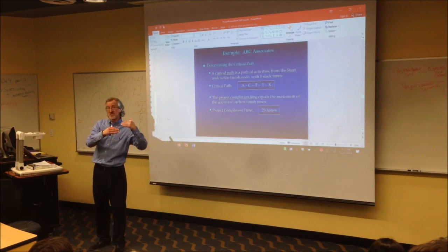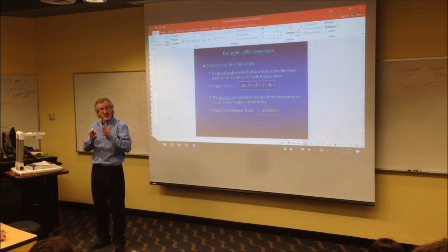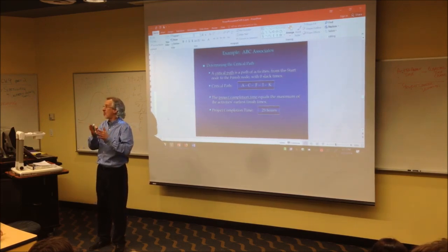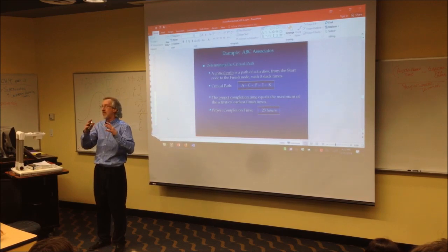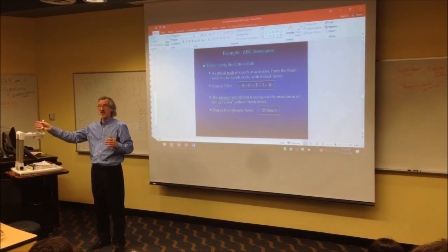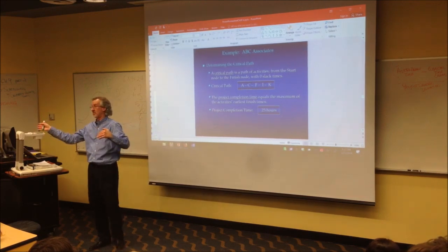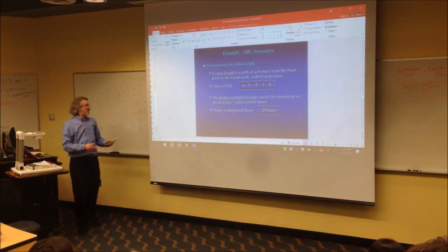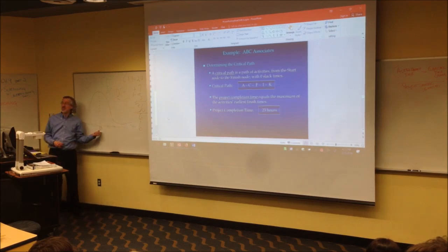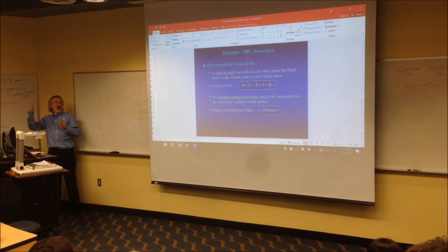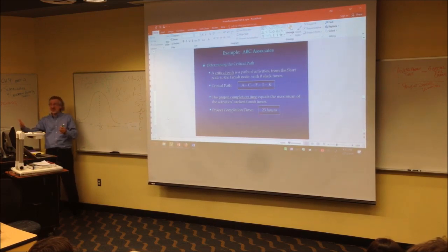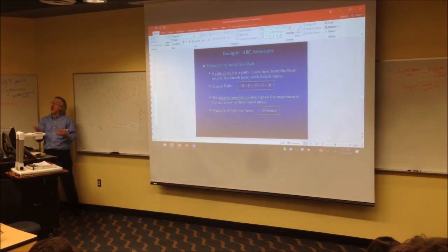And if that project isn't done by the time you have to start paying that principal, your cash will start going out the window fast, because you are not budgeting to use your cash to pay the principal. You're budgeting for the revenue of that project to pay the principal. That's the whole point. So what you need to do is figure out what amount of time will give you a higher percent chance that this project will be done in that amount of time or less.